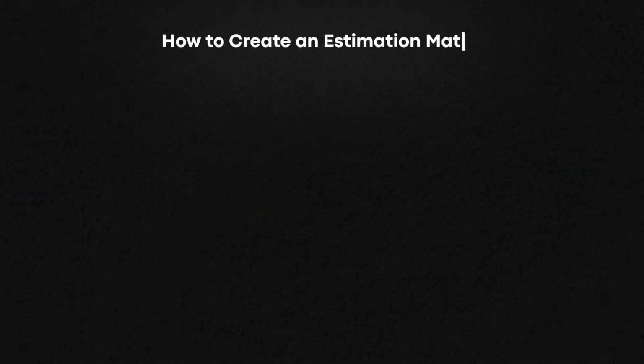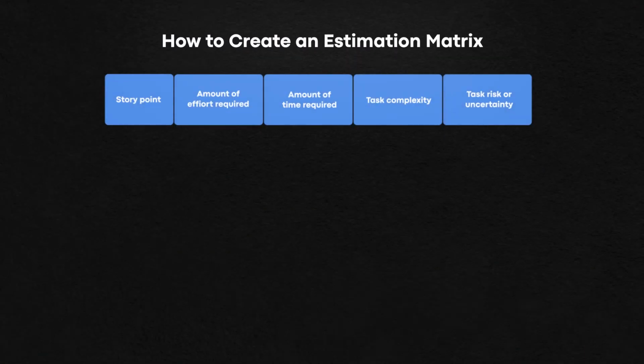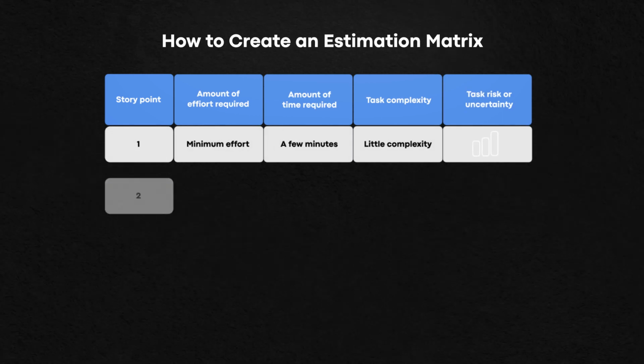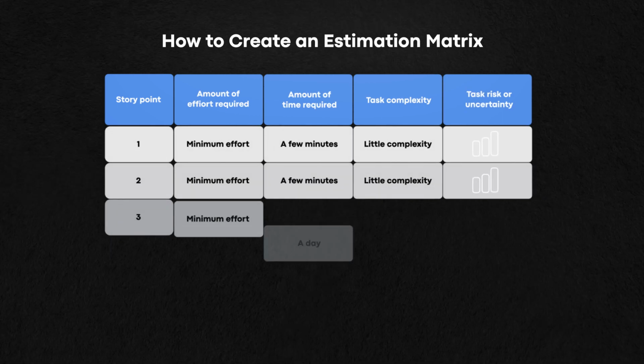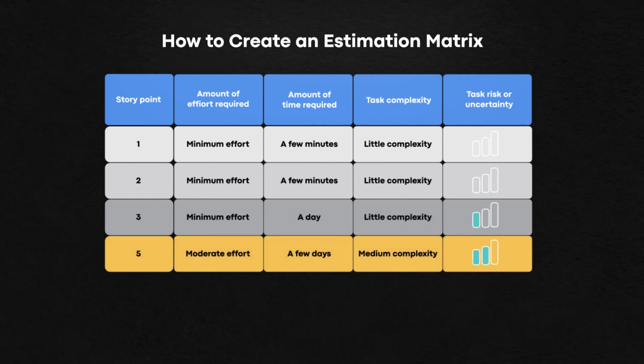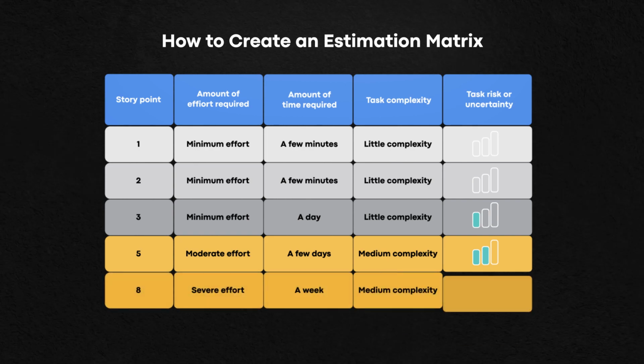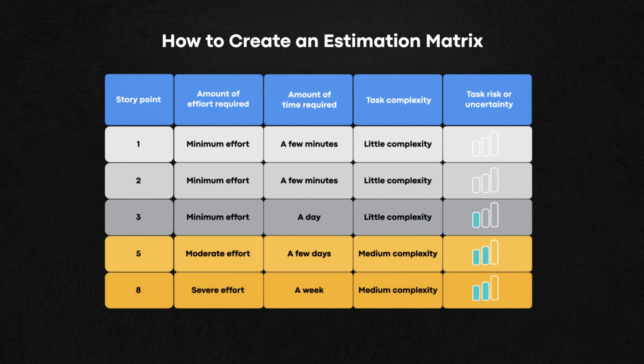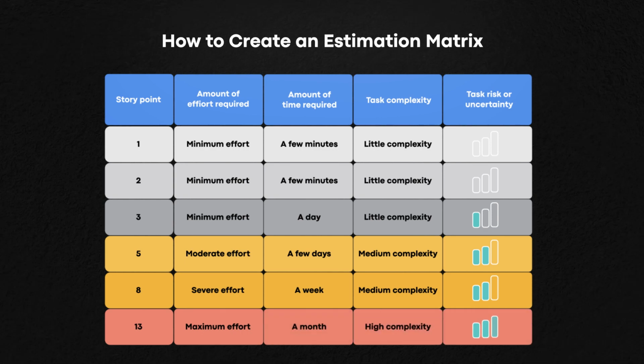But having that rough guideline of whether you think it's going to be 1 sprint, 2 sprints, or, like you said, if it's something so huge that it will probably be a few months or whatever, we need to break that down into smaller stories so we can figure out all the interdependencies around that and what is making it so long, and be able to manage it a little more closely. Otherwise, it's easy to have a few months go by and you're not shipping something where you can get feedback on it or figure out whether it works or not. But you will see story points misused quite a bit.